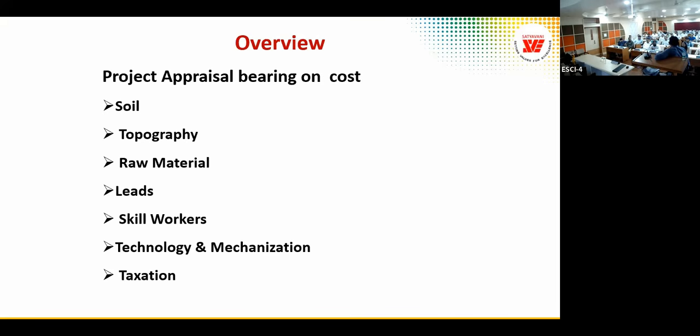So what is the costing of total station? Total station survey, 1 kilometer, what is the per rate? Total station, we are paying about 20,000 rupees per acre. If it is big, it is 1,000 rupees. On the roads, in terms of kilometers, per kilometer, that is like an EPC contract, we do the cutting, filling, all revenue survey, all that, it is costing a lakh per kilometer.